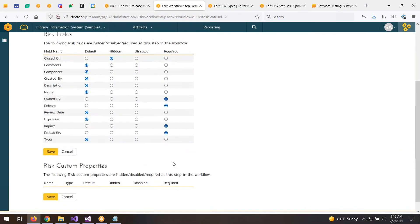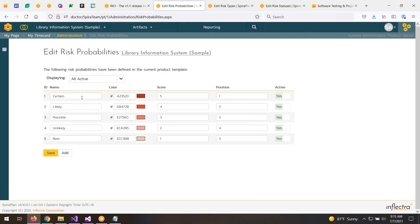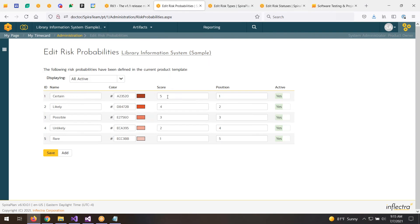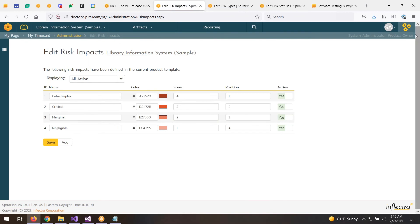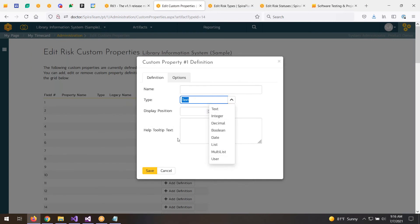We can do the same for any custom fields we've added. We can also customize the critical KPIs — the probabilities: certain, likely, possible, unlikely, and rare. We can change the color using the color picker and change the score value, which is used to multiply to create the exposure. This is a linear scale; some customers prefer an exponential or geometric scale. The same customization applies to impact as well. You can add custom fields, which will then appear in the risk form.